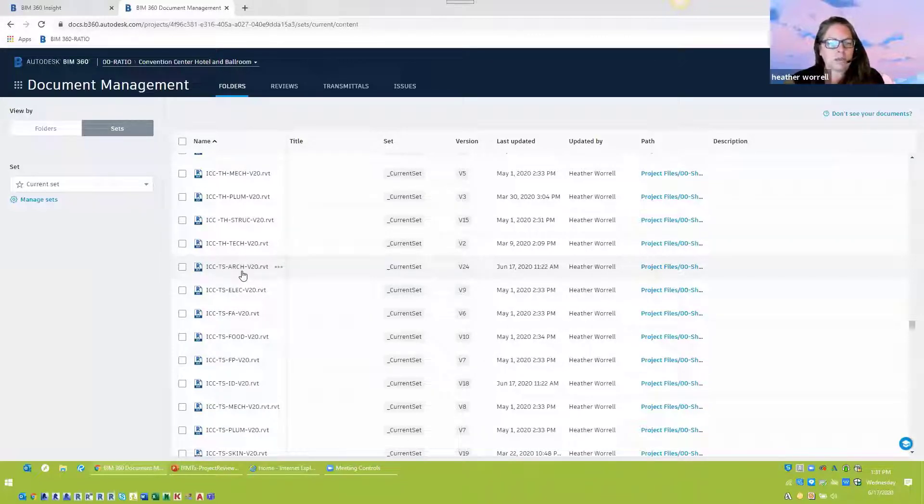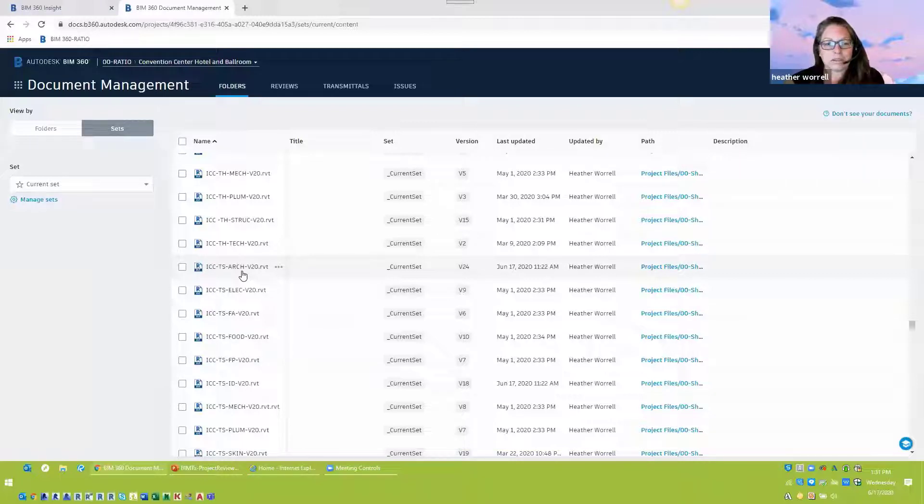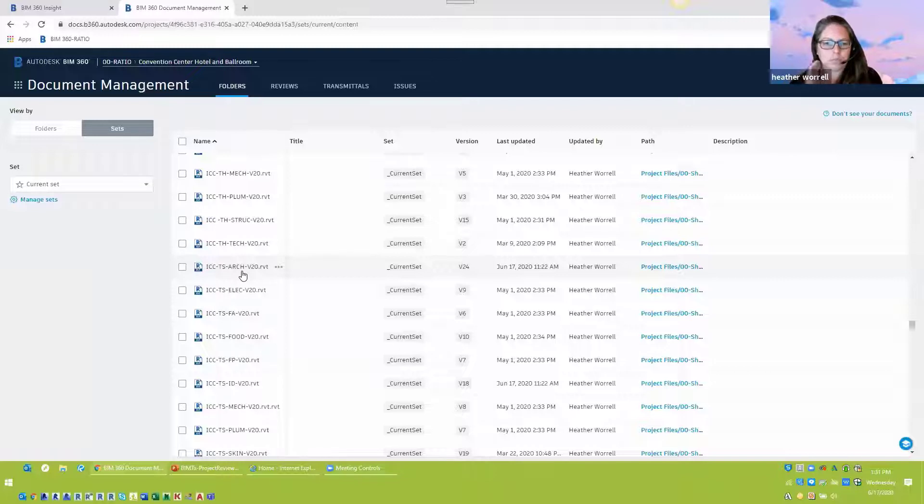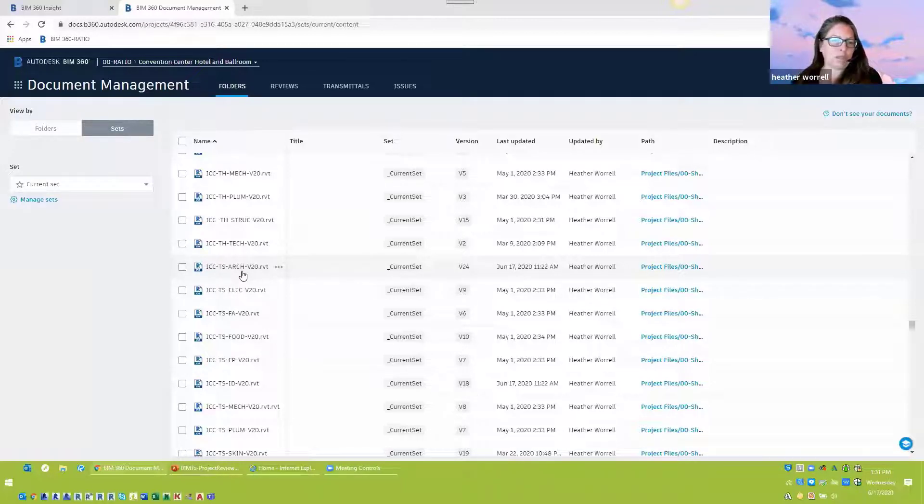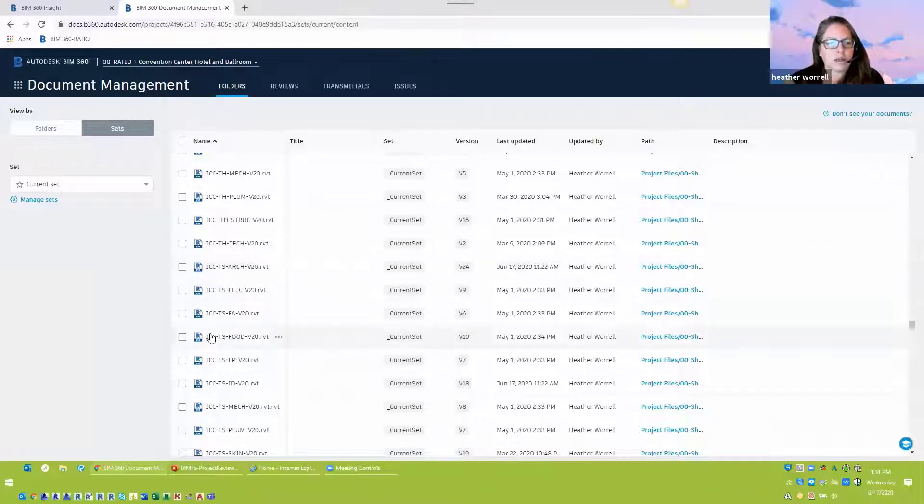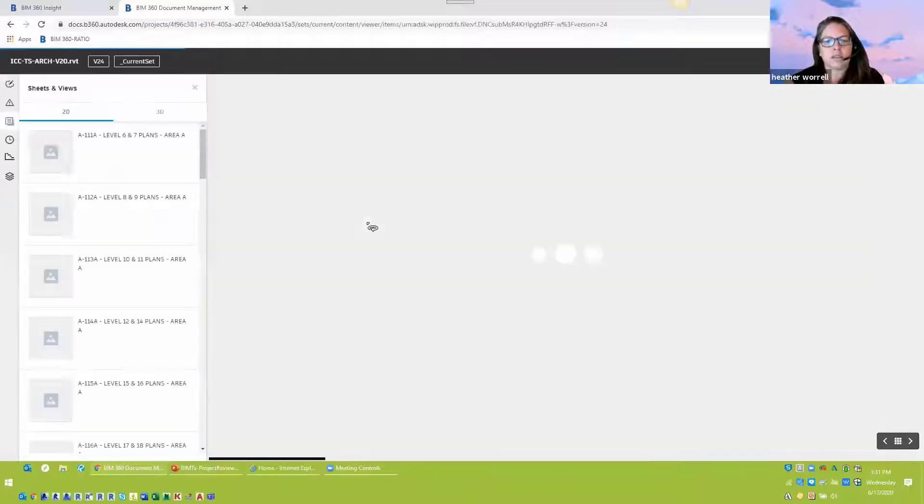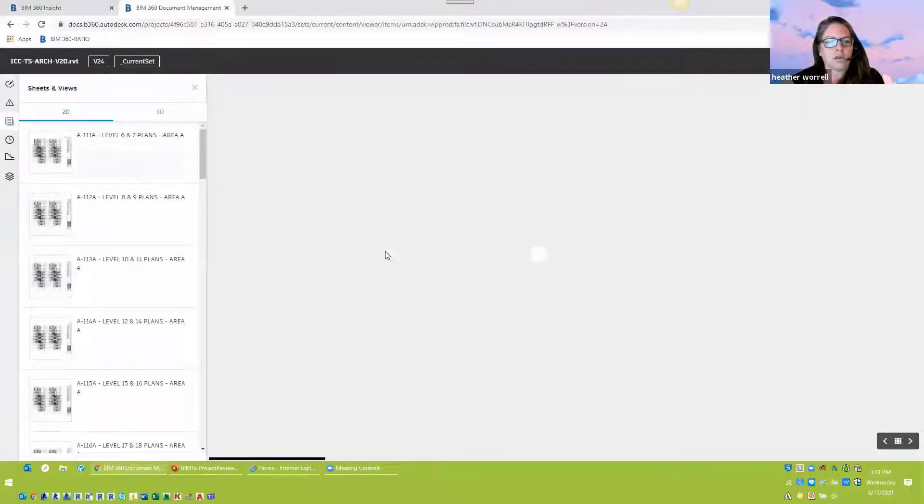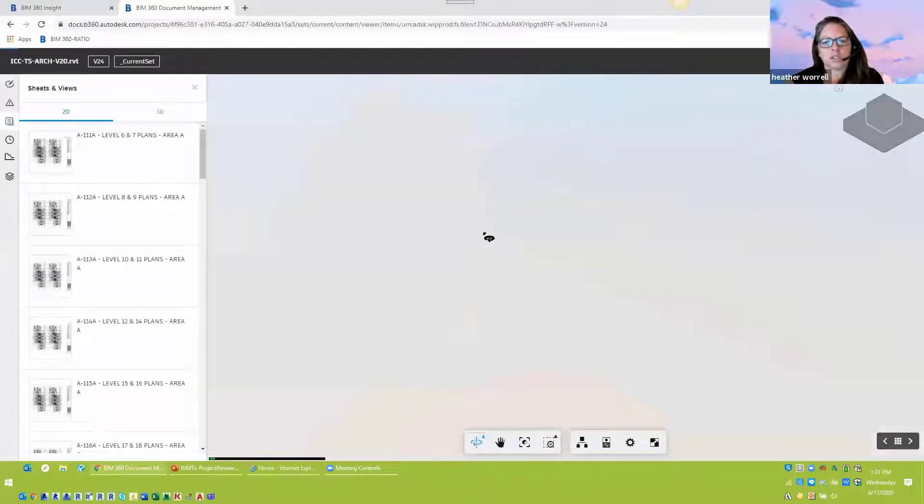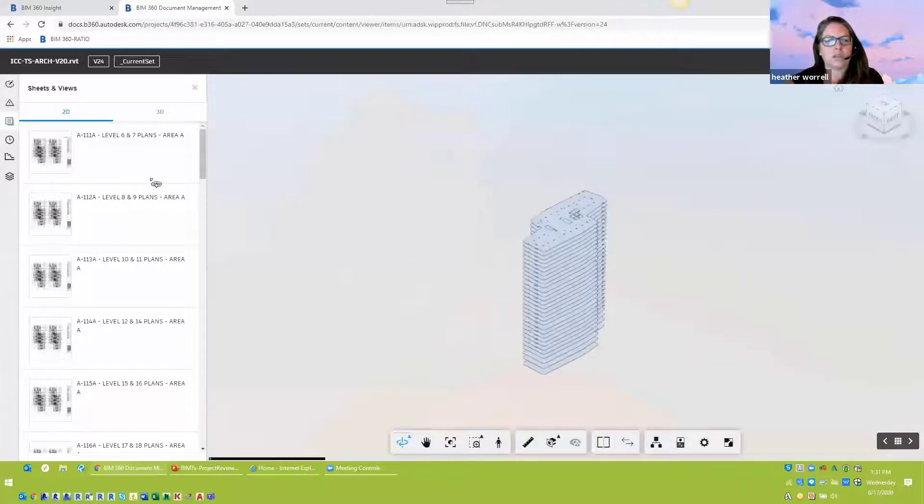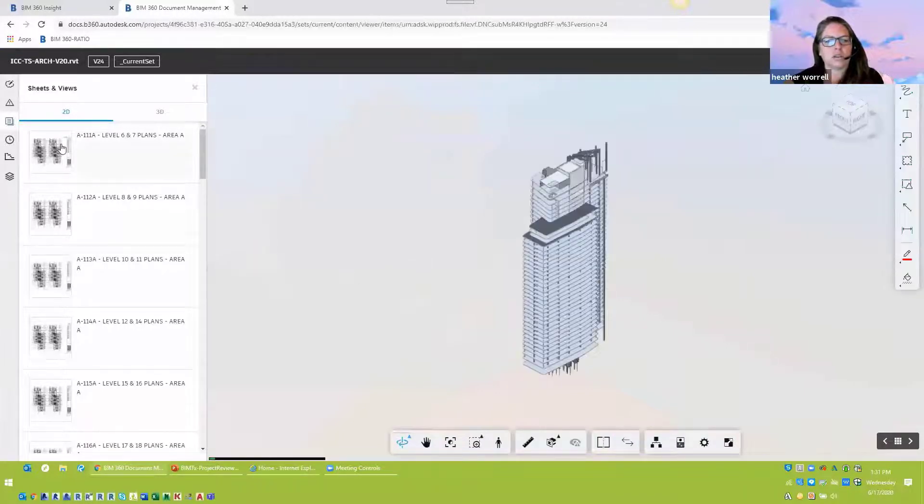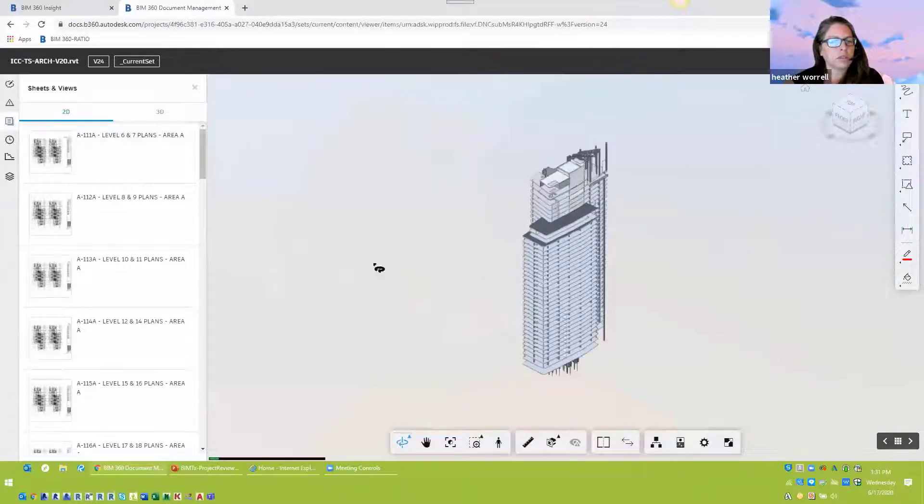So that's one thing with Bluebeam is that the data can get out of date pretty quick as people, if your project team is moving pretty fast and somebody's done a markup last week, you might have already picked up all those comments. So that's one thing where I like the fact that all these markups and the issues will stay on the sheet and then you can update it further.